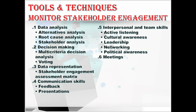Next is the decision-making technique, which contains multi-criteria decision analysis and voting. In multi-criteria decision analysis, the criteria for successful stakeholder engagement are prioritized and weighted to identify the most appropriate choice among stakeholders. Voting can be used to select the best response for a variance in the stakeholder engagement process. The data representation technique contains the stakeholder engagement assessment matrix, which supports tracking changes in the level of engagement for each stakeholder.